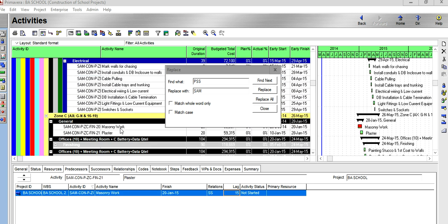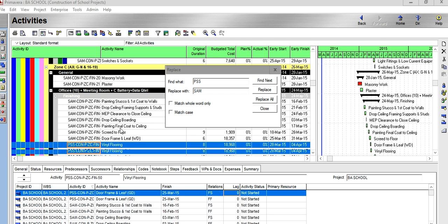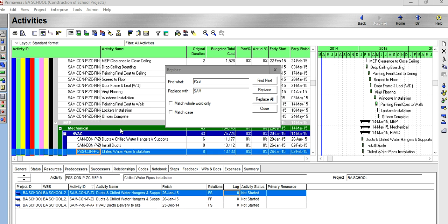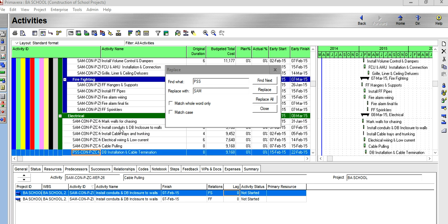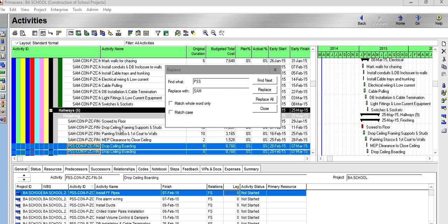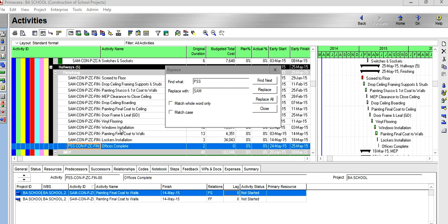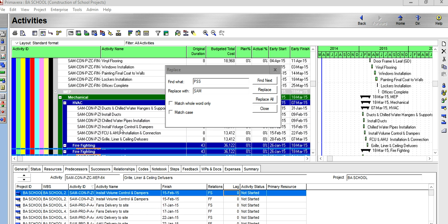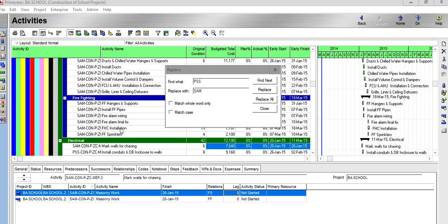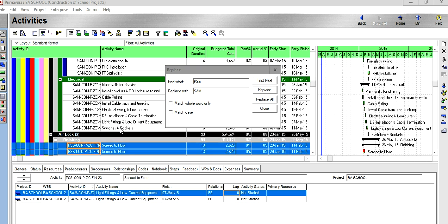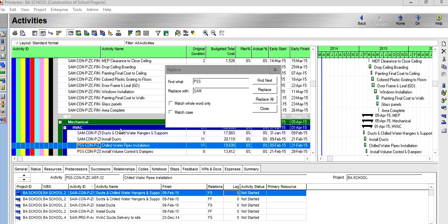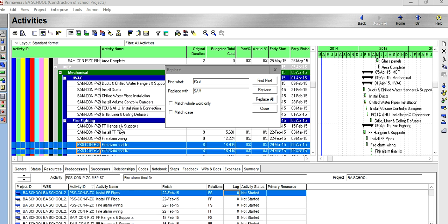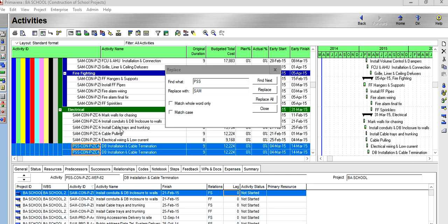So you have to link the cost in the Primavera schedule, so that you calculate the right cost of the project. You have to link everything to avoid failure of the project. So if you have an estimate, link it to the Primavera, link to the design, and link to everything.